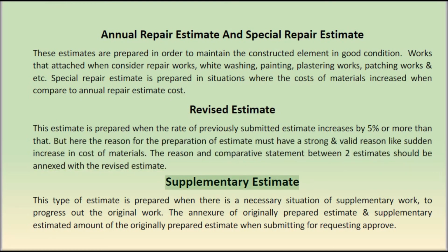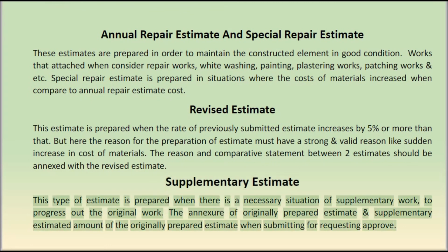Supplementary estimate. This type of estimate is prepared when there is a necessary situation of supplementary work, to progress the original work. The originally prepared estimate and the supplementary estimated amount should be annexed to the originally prepared estimate when submitting for requesting approval.